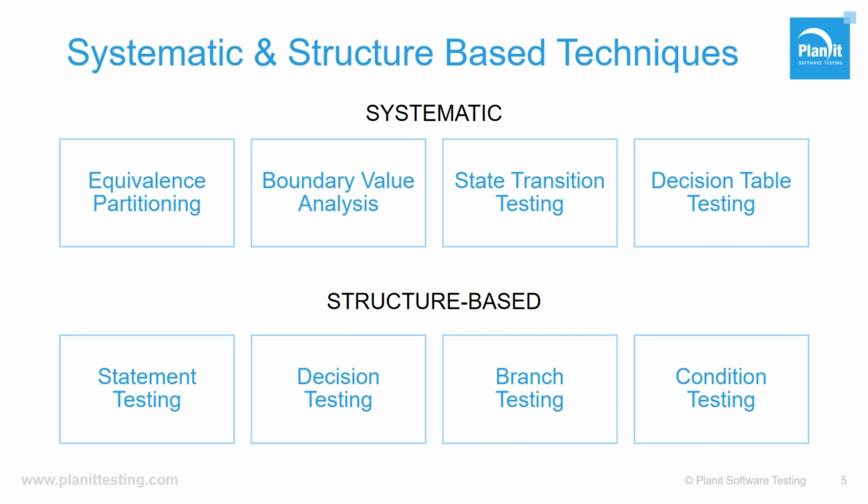Then we need to make a decision to say 100% coverage, maybe 10 tests, but from a risk-based perspective, we might decide that for high risk we do all 10, for lower risk maybe we do 2 or 3. And we need to have that analysing happening before we even create any of our tests. So whilst in a traditional project testers should be using testing techniques, they actually become critical and very much a focus of best practice when we're moving into the Agile space.